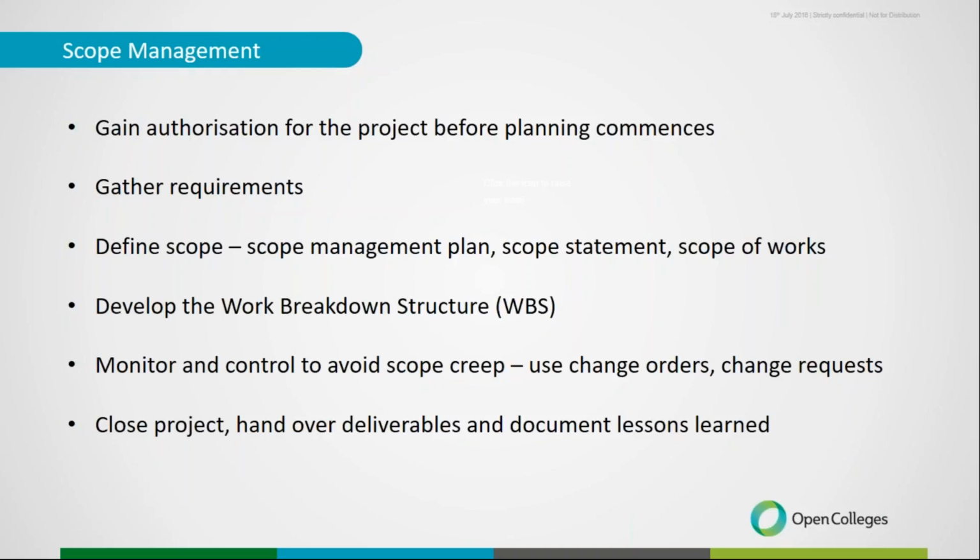Once that's done, you can develop your work breakdown structure, which is the breakdown of the work in the project. And then from that, you are then able to do your estimates for how long each one of those work packages are going to take, what budget, what resources you're going to need, if you're going to need to procure any supplies or external things for that.